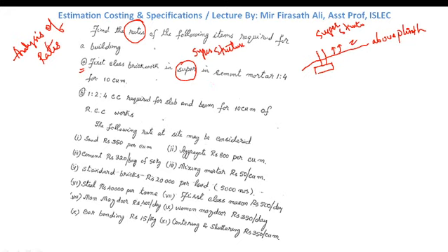So, first class brickwork in superstructure in cement mortar. The ratio of the cement mortar is given as 1:4, where 1 is cement and 4 is fine aggregate, which we call sand. This is for 10 meter cube. The brickwork quantity is 10 meter cube, as given in our problem.